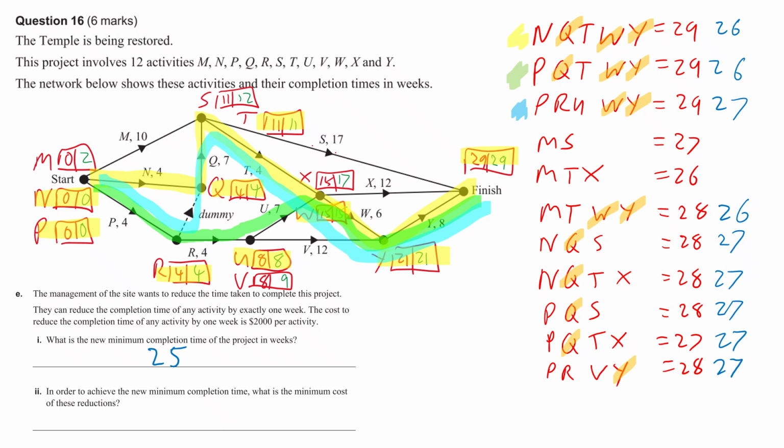Now I've got a bunch of 27s that got a P in them. Is that right? So I'm going to get rid of the P. P, P, P, P, P. So anything that had a P in it goes down by 1. So that's going to be 25. That's going to be 26. That's going to be 26. 25.